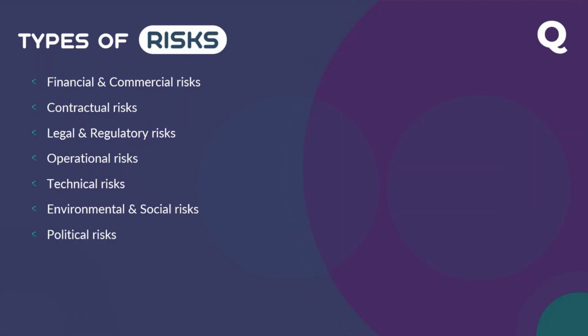And resource shortage also, because when you submit the tender, you have already obtained the subcontractor and supplier quotations, everything is ready with you. You know you already have labor, and you will be very optimistic about obtaining subcontractor labor or a labor supply. But if you have less labor available, you can mark it as a risk. Dear manager, as per our internal labor, we have this much only, but as per the requirement of our tender program, we have to provide this much labor, so we should be ready. That's the point you can make.